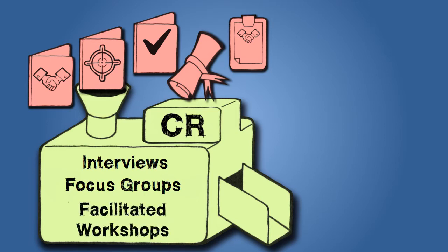Facilitated workshops differ from focus groups because, although still moderated by a subject matter expert, a facilitated workshop brings together key stakeholders that will help define the requirements of the deliverable. One of the most common types of facilitated workshops used in the software industry is what they call a JAD session, or Joint Application and Design Sessions.